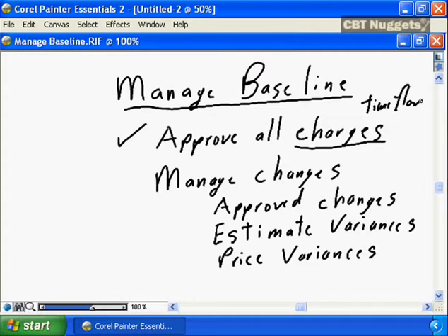If a large invoice has come into the organization for your project, you know the invoice has been received, or you're expecting to receive it. Therefore, your cash management plan says that for this month of my project, I need to be prepared to spend $20,000 for this material. And you look at your accounting sheets at the end of the month and the charge isn't there. You need to go looking for it to ensure that the invoice has been received.